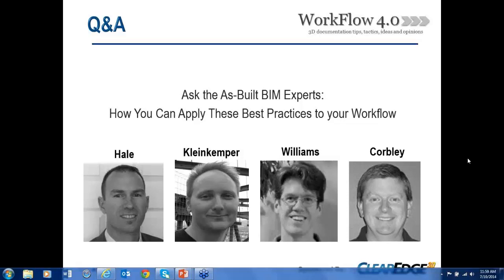What methodology do you use to plan out scan locations and the number of scans for a job? If they can get a floor plan plus photos from a client, Greg will take those, lay them out using Bluebeam Revu as a PDF tool, and do his best guess for scan locations. He'll make sure there are scan locations in front of things like deep window wells. For structure, he might add four or five extra scans in a particular area. More or less, it's a straight-up estimate: predict scan locations, lay them out, add them up, multiply across time, and add a safety factor for throwaway scans.